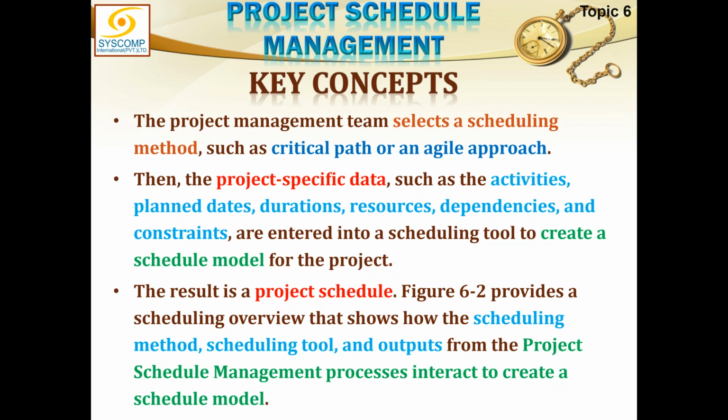So the first schedule model will no more remain the same, and with a slight change in data, it can become a different schedule. So a second schedule model instance, and then third and fourth, and this keeps happening while we are planning. We keep planning, and this data keeps changing, and ultimately the schedule model keeps changing. These are called schedule model instances.